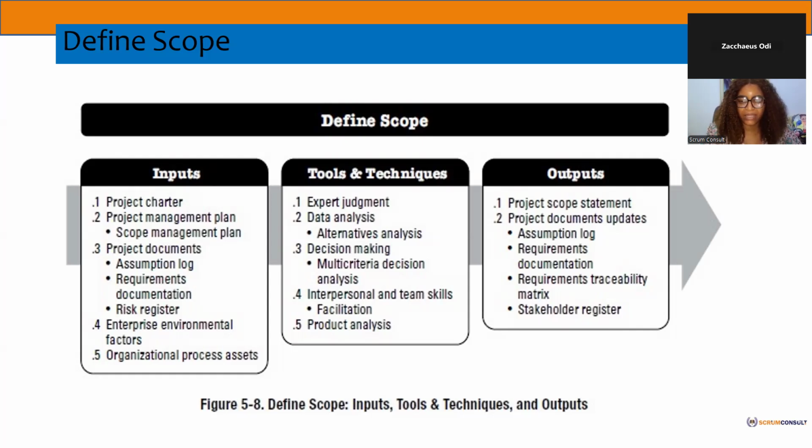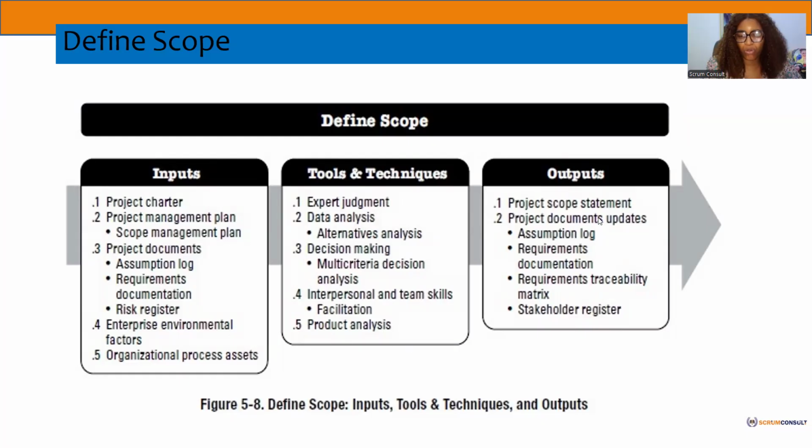All right. So as he has said, most of the time the reason we analyze products is for us to be able to understand what the product does, how it's going to work, what the customer needs it for. It helps us to define and sort scope when we have this better understanding. And you have your project scope statement as the output for this.